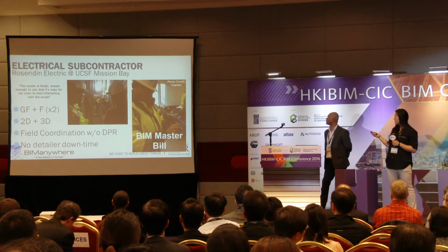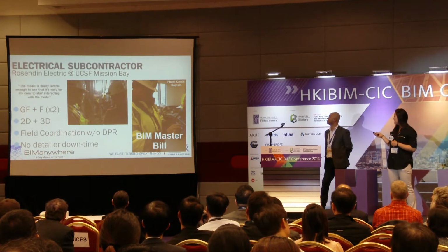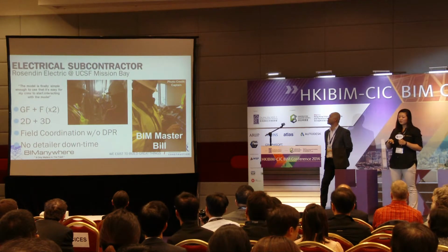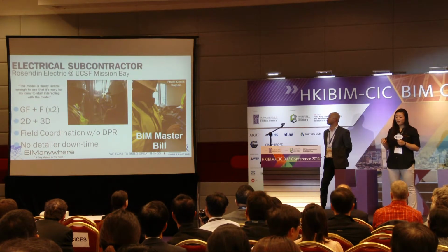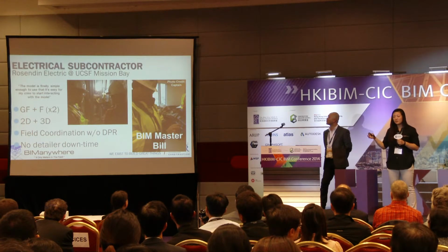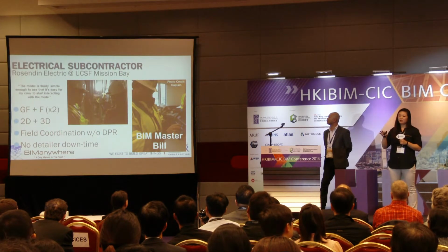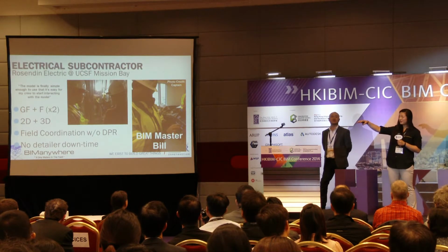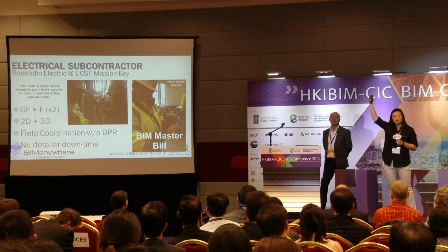What the foreman said was that having the 3D model out in the field helped his journeymen and apprentices view what needs to get installed. It helps them visualize, hey, I shouldn't put something there because I'm going to be blocking someone who needs to install something above me.